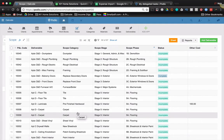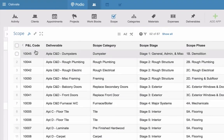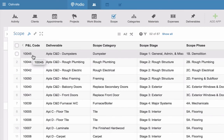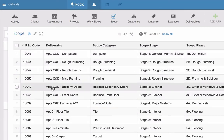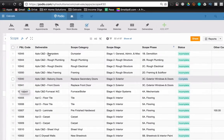Where I had run into trouble previously was, I'm able to get the budget down. But how do I track the actuals? We use QuickBooks for everything when it comes to accounting, but it's tough to get my actuals into Podio. So we solved that with a very simple setup. It's pretty simple once it's set up, but basically using this, what we call PNL code. And all that is, is the unique ID of the deliverable. It's a five digit unique ID that I had set up through the app settings. And we just built in the routine of tagging every single expense in QuickBooks with that five digit PNL code. And that way they can talk to each other.